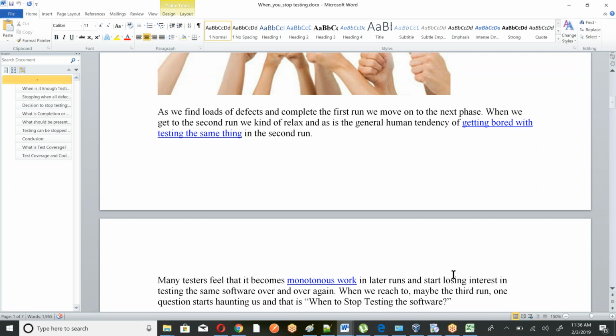But in QA Agile methodology, they say an effective team should have 7 to 10 people. If they put 30 people in one Agile team, then it's going to be huge, because in the morning meeting, if each of 30 people takes 2 minutes, it's going to be 1 hour for the meeting only. It is difficult to manage all tasks and it is going to be a mess.